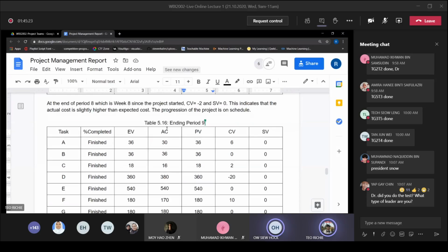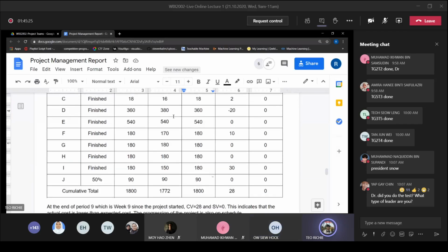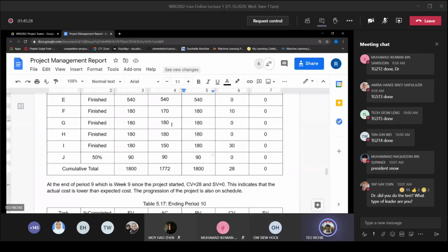By the way, doctor, this is our cut-off period, ending period 9. So what's your status now? Our CV is 28, SV is 0. Okay, so that means you're positive. CV 28, so that means you are under cost. And you're on time. Okay?